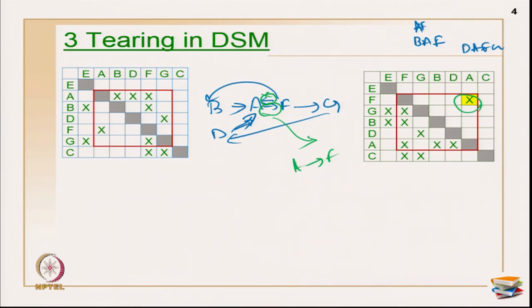So, this is one way of evaluation, because when I opened up the whole graphical representation, I saw this one relationship A to F is actually causing three loops to exist there. If I break this one link from A to F, automatically all three loops get erased. So, I have chosen one with the help of my graphical evaluation. There are other methods also available for the same.